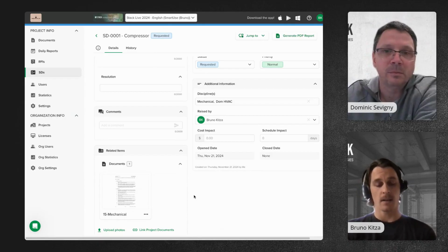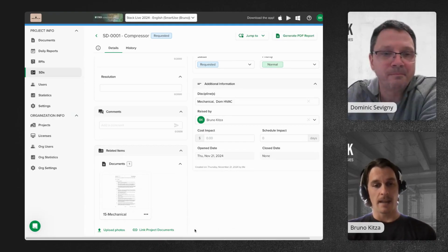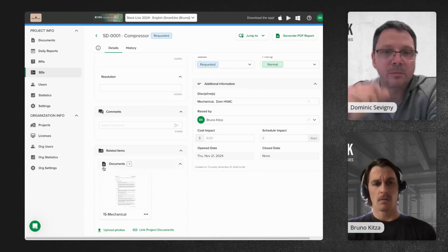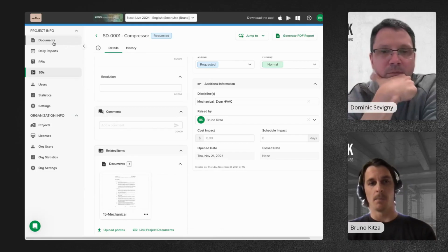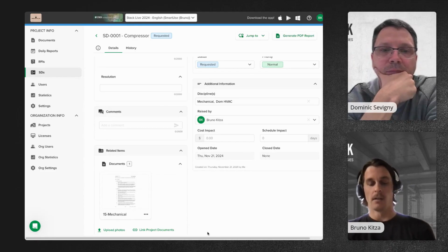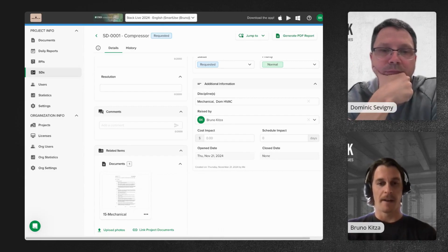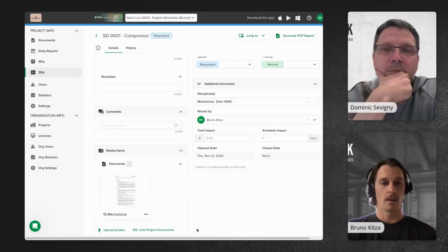We can go through the whole process of getting the shop drawings approved, and only then, so we might need a bit of a back and forth and revisions that I don't actually want to make available to all my teams out in the field. I want to keep track of those. So I can attach it to this shop drawing request, and then only when it's final, stamped and fully approved can I upload it into SmartUse. I'm sorry, Stack, and take it from there. So in a few weeks, this option will be made available for all the Pro users of Stack.